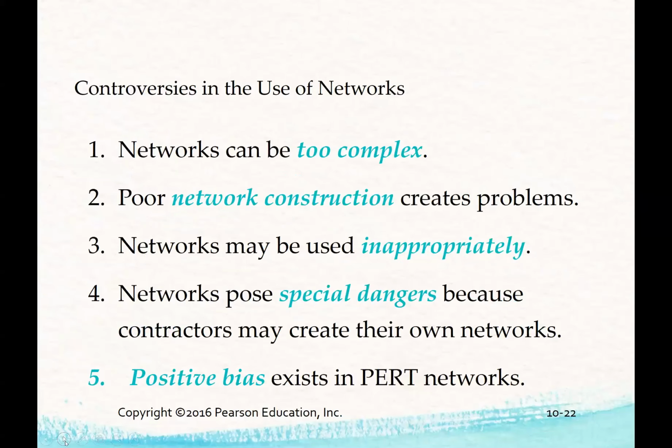Networks can be used inappropriately. If you have a lot of scarce resources, then you might find that you don't get the resource you need on your project because the functional managers or other project managers don't give up those people, so they can be used for evil purposes. If there's not a lot of communication between the project manager and contractors, your contractors could create their own network diagrams which don't blend into your network diagram. So you're looking at not having that hammocking and not sharing that information.